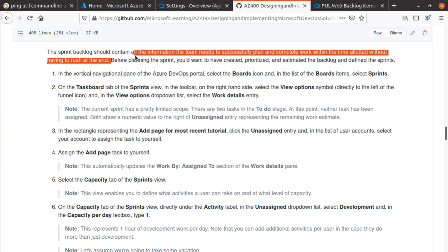So I always feel like multiple smaller stories are better than a large story, because your risks are less. With the smaller stories you can track the progress better. You can mark the smaller ones, okay, these are the ones that are done. If you have everything as part of one big story, you cannot mark the whole story as done. So you get used to it and get better as you go.